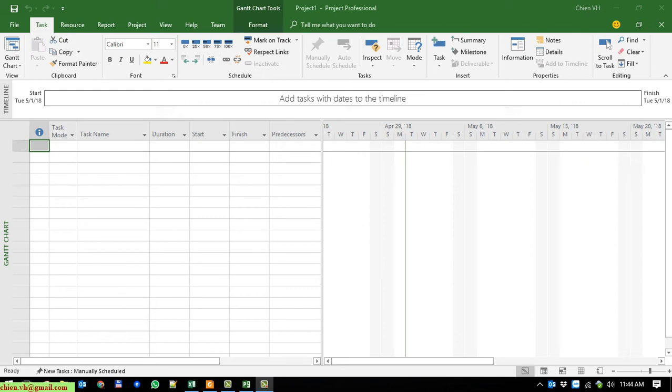Hi, in this video today I want to show you how to change the default working hours per day in Microsoft Project. By default we have 8 hours per day working time for your project, and in some cases you want to change it to another time like 4 hours or 6 hours per day. Follow along in this video to see how to do it.